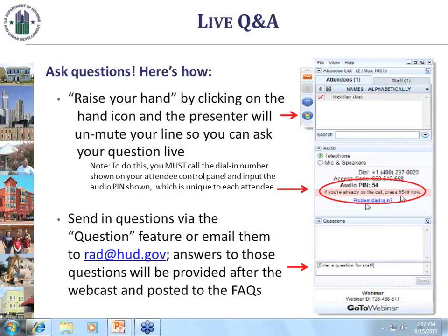What you have to do is default to whatever your state enabling legislation says about public assets: are property owned by public housing authorities exempt from local taxes? In nearly every state in the United States, property owned by a PHA is exempt from taxes. A lot of PHAs, even if they convert to Section 8, wouldn't have to make a pilot payment. They could be completely exempt. Many PHAs, to maintain cordial local relationships, have talked with their local governments and said, I'll tell you what, when I convert, rather than not paying anything, I'm going to continue with a pilot payment in good faith. That's up to you.